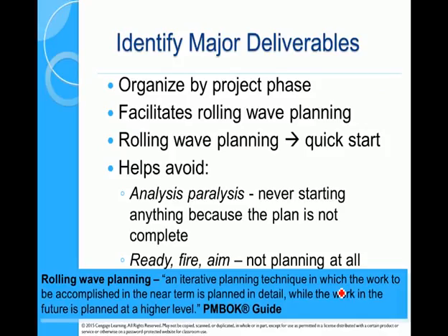Well, we start with major deliverables. In our patio example, we had paving, roof. They're the things that we record, they're the things that we say, yes, I'm happy, I've accepted that. In construction of a house, we might look at foundations, we might look at the walls. They could be major deliverables, but then we divide those deliverables up into smaller parts.